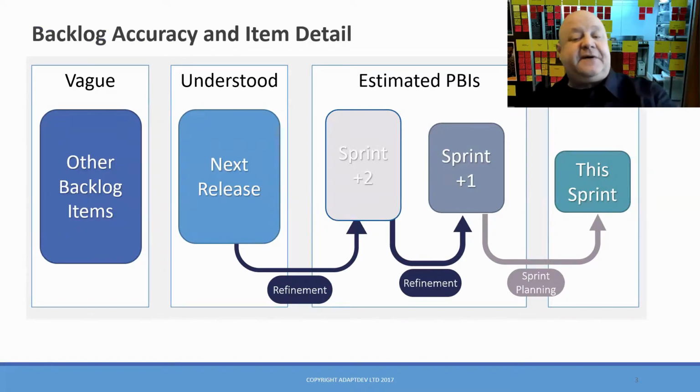And then to specify that along the levels till it becomes potentially deliverable within any sprint going forward is the goal of bubbling up that product backlog item idea, generally from what we see at the bottom of the backlog up to the top 10% that's in a ready state that can be delivered, right? So it may come in vague. We'd like a reverse gear for a motorbike. Go do some research into what that actually means and understand how it could be brought into the next release.